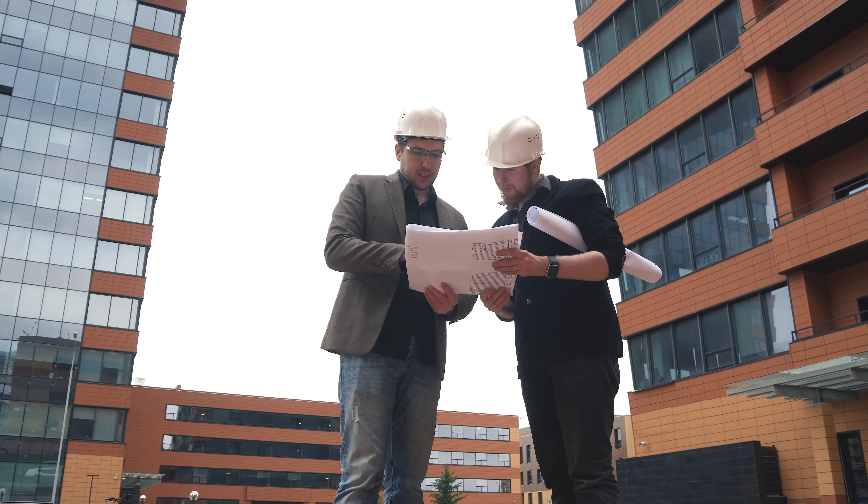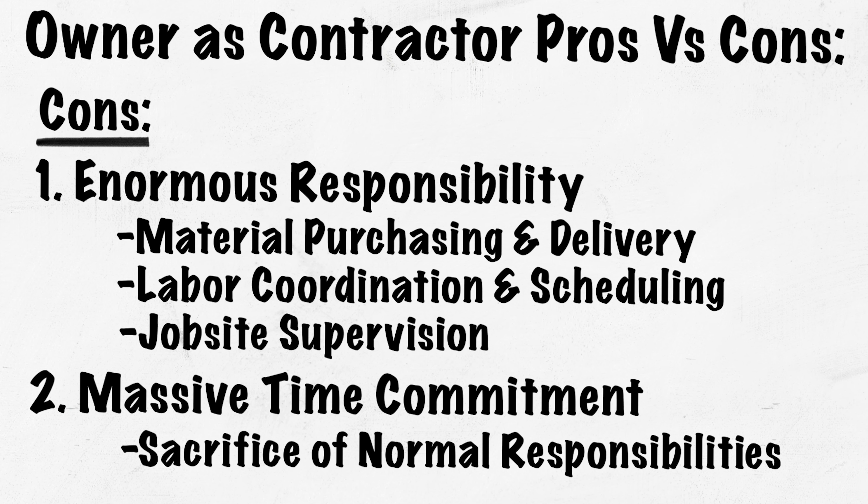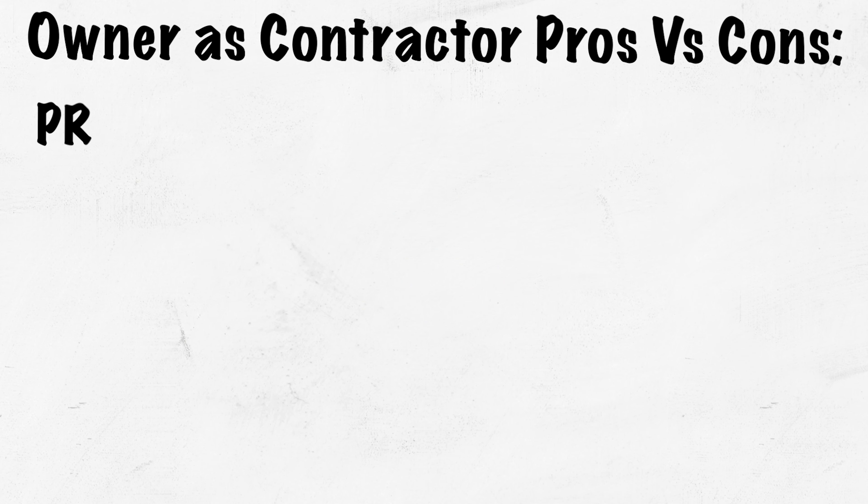At one point I invested in building an office building. Being an architect, I was able to design and get the permit, but the construction — I thought I was going to serve as general contractor, though that required a lot of commitment. The project lasted about eight months and I couldn't do any design work during that time. I was on the phone from six in the morning making sure everyone showed up. My philosophy was: when the last contractor leaves, then I go home — which meant I was on the job all the time. That requires a lot of dedication, but I was able to save a lot of money doing it that way.